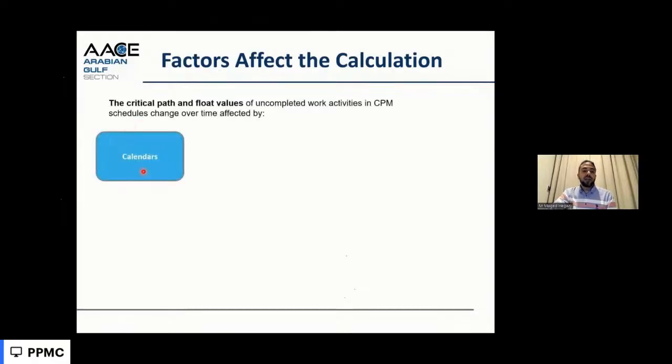It can be affected by the calendar days, because we will not work the whole days. We can work and have breaks and vacations and the holidays. So these vacation holidays need to be considered. If we have 5 working days a week or 6 working days a week, and we have Eids and other vacations, all these things need to be considered during the calculation, and it will affect the calculation.